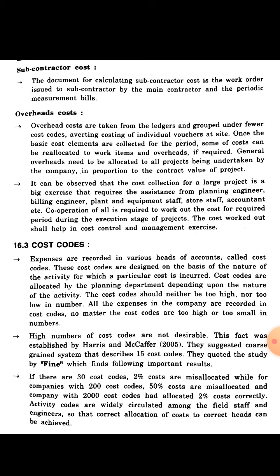A high number of cost codes is not desirable. This fact was established by Harris and McCaffer in 2005. They suggest a coarse grain system describing about 15 cost codes. They quoted a study showing that with 30 cost codes, 2% of costs are misallocated, while with 200 cost codes, 50% of costs are misallocated, and a company with 2000 cost codes had only 2% of costs allocated correctly.